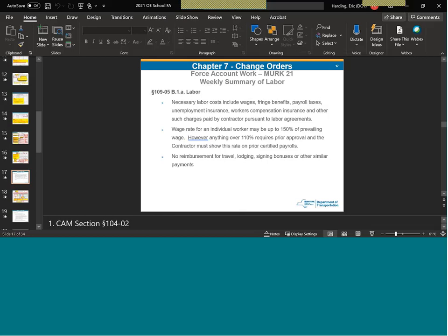Because the cell is locked in, any time you put in a value for the services on your MERC summary on the spreadsheet, it's going to put 5% on it automatically. And it doesn't appear to be applicable if it is a service under time-related dispute compensation.